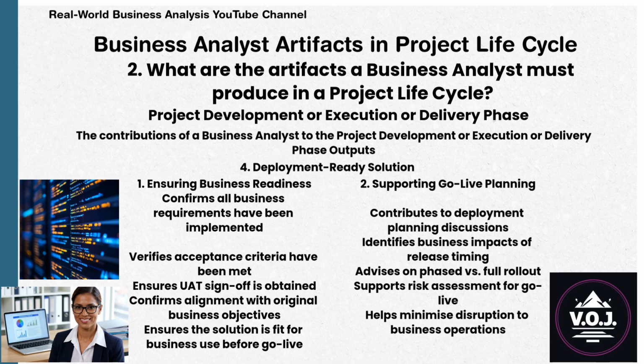2. Supporting go-live planning. The BA contributes to deployment planning discussions. Identifies business impacts of release timing. Advises on phased versus full rollout. Supports risk assessment for go-live. And helps minimize disruption to business operations.